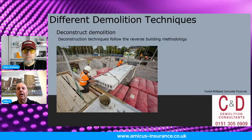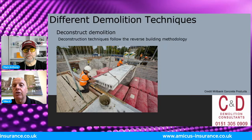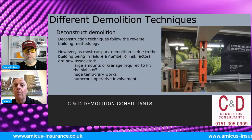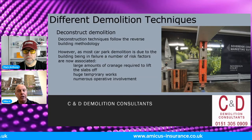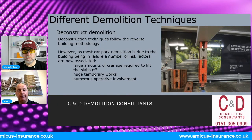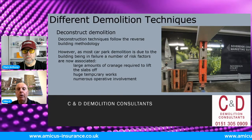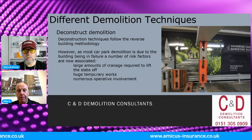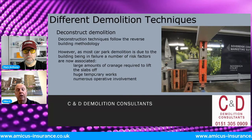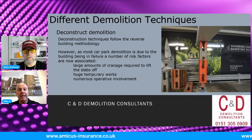Okay, Ange. Another method we see being used is deconstruction. How do we deconstruct it? Well, we basically follow the reverse methodology of how the building was built. The problem with this deconstruct method is that we have to use a huge amount of labour. And when I talk about labour, that is to put in place things such as the propping. We can see here one that we were involved with in Hammersmith, where we put some really strong propping systems in place. The problem is that we have to prop each truss throughout the building, again putting people's lives at risk going underneath, when in fact, if we created an exclusion zone, we could bring it down without having to prop it.